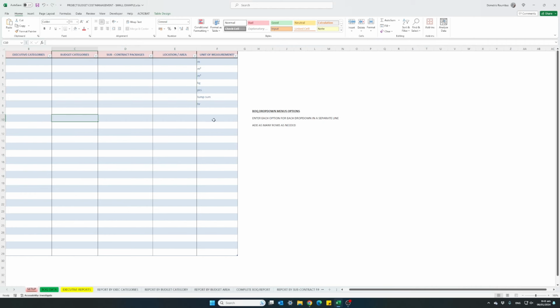So the first thing in a project is preparing a budget. We have our quantities for the floor tiles installation for the 3 areas per square meter, and this is our estimated unit price that the builder will charge for the floor tiles installation. Our budget estimate is 5,880 euro, and this is shown in our cost projection, 5,880 euro.